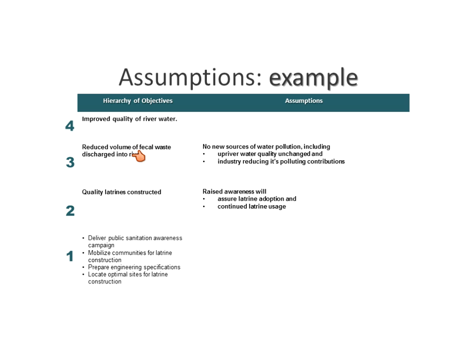So even though we may be successful in the project that we're designing for a particular village, if this upstream situation exists, then we've just totally negated anything that we've done. So that's a killer assumption. That's an extremely important risk that this project must look at.